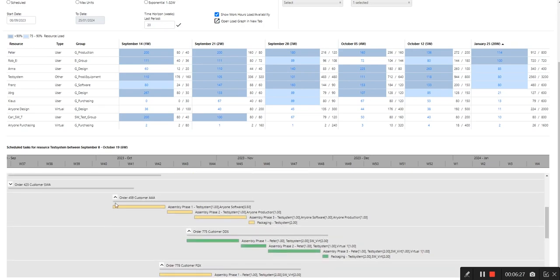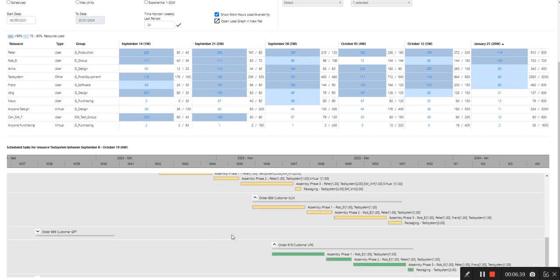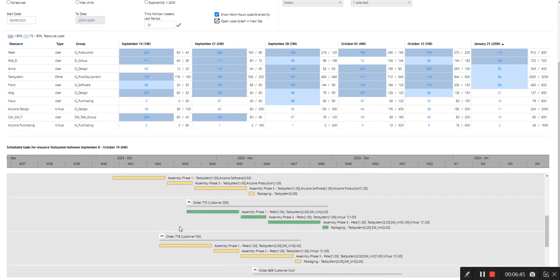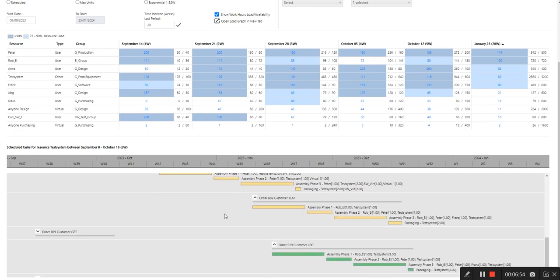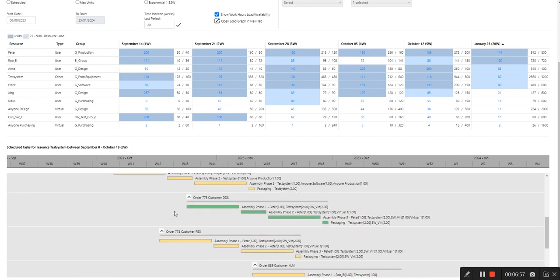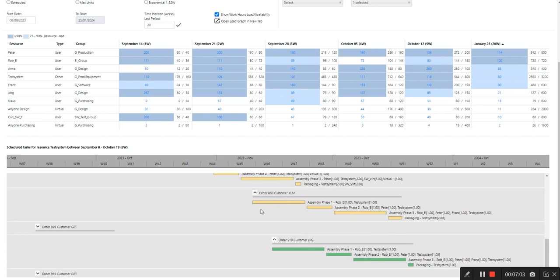So it looks like this one is going to have one, this one is going to have the other one, and you're going to have the third one, because it is better that this one waits till it's released by one of the others, and that this one waits until one of the predecessors is releasing the test system. So I think it is important here that you get confirmation that there will be a test system waiting when you need it.